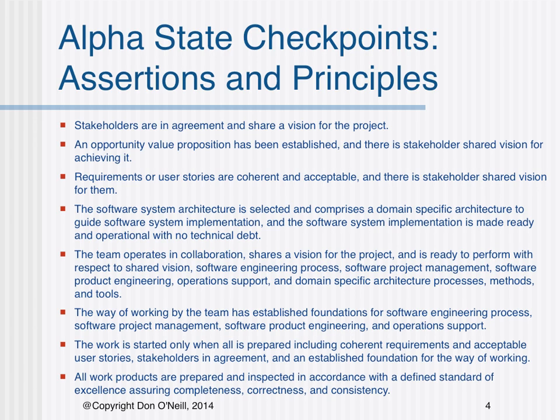Number six, the way of working by the team has established foundations for software engineering process, software project management, software product engineering, and operations support. Number seven, the work is started only when all is prepared, including coherent requirements and acceptable user stories, stakeholders in agreement, and an established foundation for the way of working. Number eight, all work products are prepared and inspected in accordance with a defined standard of excellence, assuring completeness, correctness, and consistency.